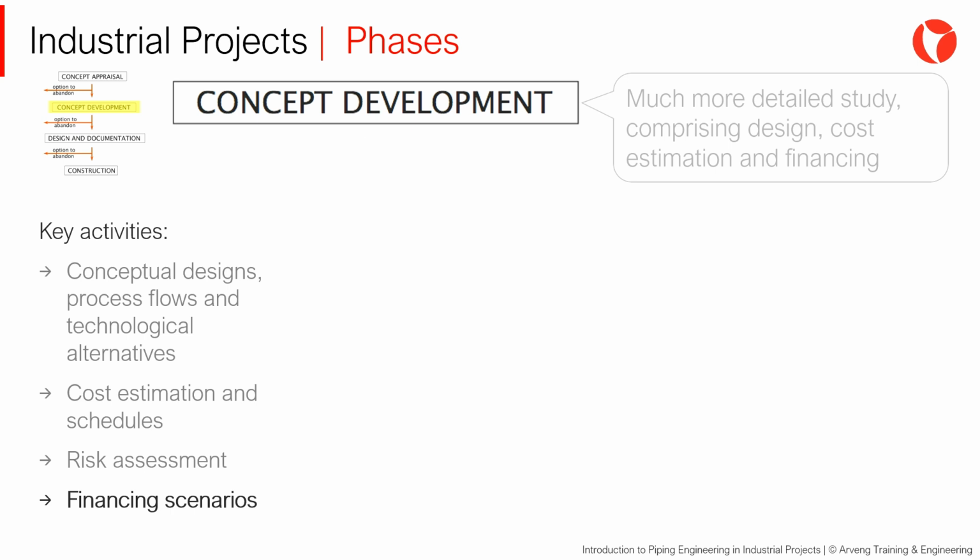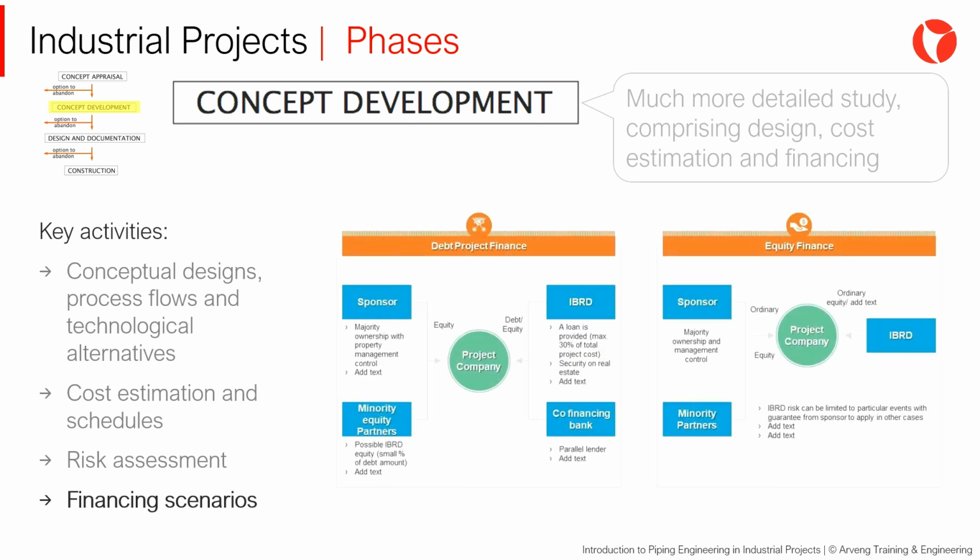Once the conceptualization phase is reached, the owner must structure the financial support to ensure that the project can be executed. There are many different scenarios when it comes to funding. It is common to propose mixed solutions in which the direct contributions of the owner are complemented by loans from financial institutions, direct participation of new investors, capital increases, or a wide variety of other alternatives.